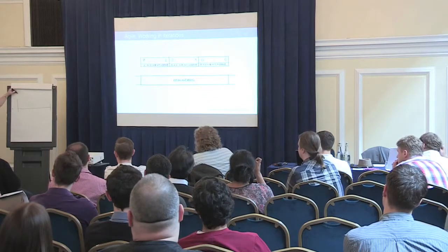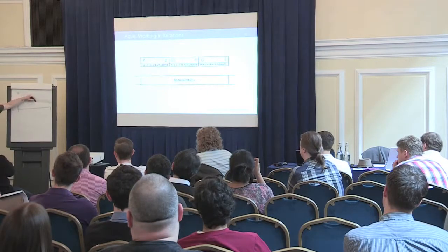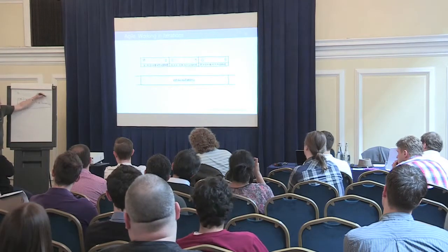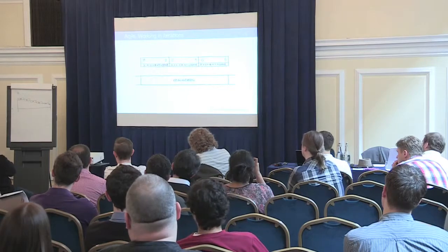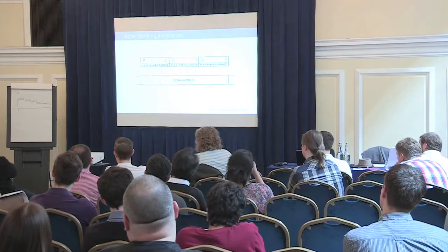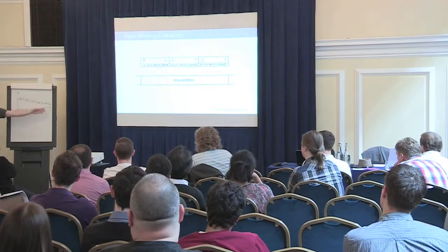So if I choose, let's say, 3 work items, they will start doing the requirements for that. Then they'll do the analysis for that. Then they'll do the design. And then they start building the stuff. And at the end, they will start testing it. And then hopefully it goes into, let's say, production, just to make it nice, right? So they'll apply a mini waterfall. And the thing is, it's still waterfall, right? It's still the model where you do everything only once.